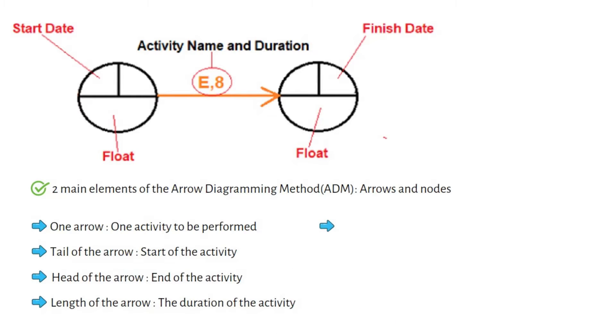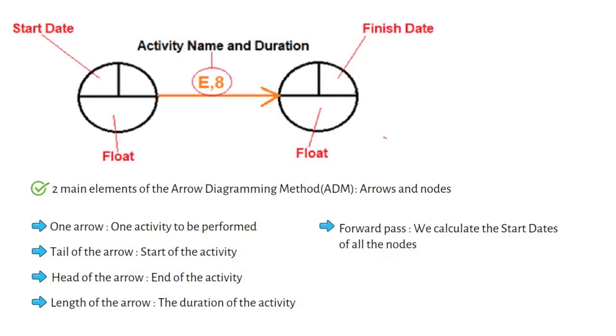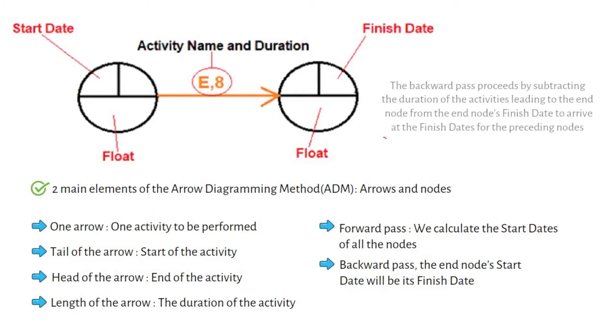In the forward pass we calculate the start dates of all the nodes. In the backward pass, the end node start date will be its finish date. In the backward pass proceeds by subtracting the duration of the activities leading to the end node from the end node's finish date to arrive at the finish dates for the preceding nodes.